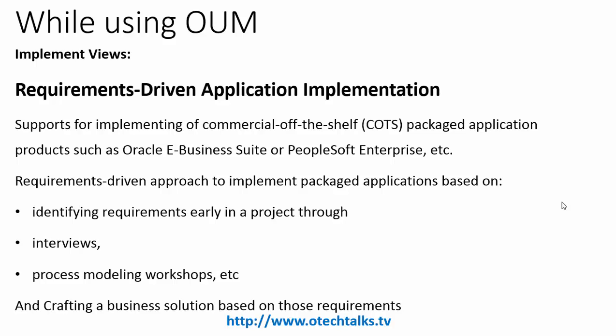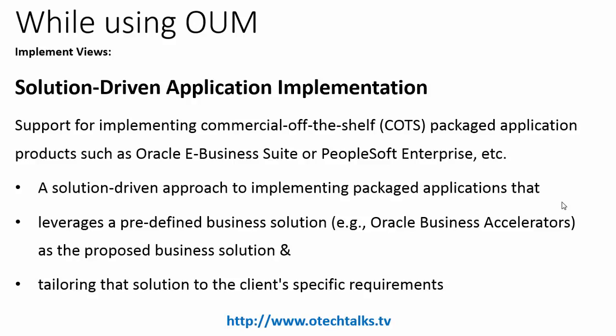Another view introduced by OUM is solution-driven application implementation. In this approach, we leverage predefined business solutions like Oracle Business Accelerators. The proposed solution is then tailored to the client's specific requirements. Rather than open-ended requirements gathering, questions are drafted based on the solution already available and then answered with end users through a Q&A process.